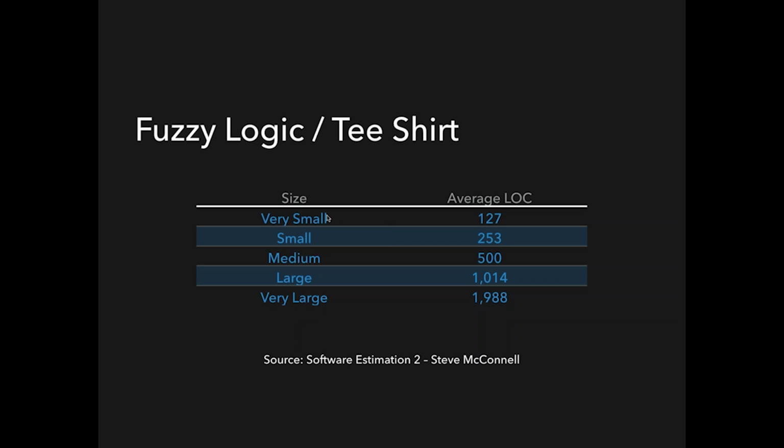PHP LOC is a great way to see how many lines of code you have, how many classes you write, how many methods per class, and then you can even tie this out, compare it to Git, and then see how long you're doing over a certain sprint or a certain cycle, certain time period, whatever. The numbers I show here are industry standards, and you can certainly modify these for your own. So now we can go into, let's say, our integration with the foobar REST service and say, you know, it's a very large right there. It's probably going to take me a lot of lines of code. And we could have verified that with our unit test right there.